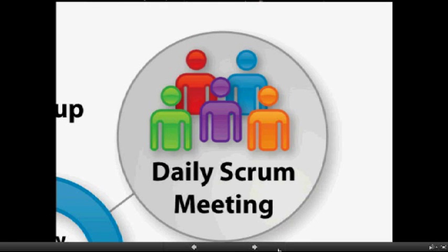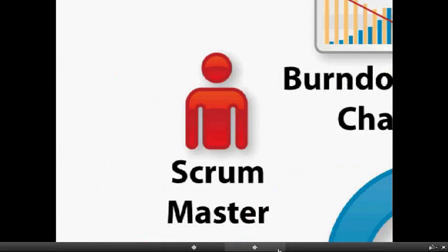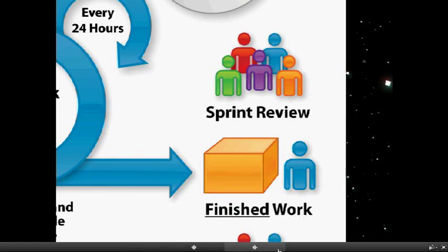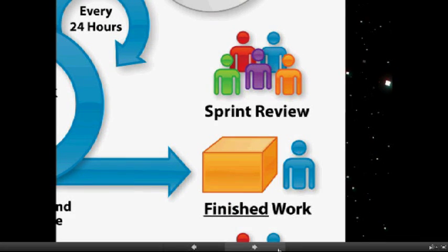These Scrum meetings are led by a Scrum Master who is a facilitator who helps ensure success, removes impediments, and aids in decision making. After each sprint, a sprint review meeting and a sprint retrospective meeting are held. The sprint review meeting is called with the client. This meeting is held to improve the product, show accomplishments, and get first-hand feedback from the client. The sprint retrospective meeting focuses on improving the team and encouraging them to make improvements in every sprint.